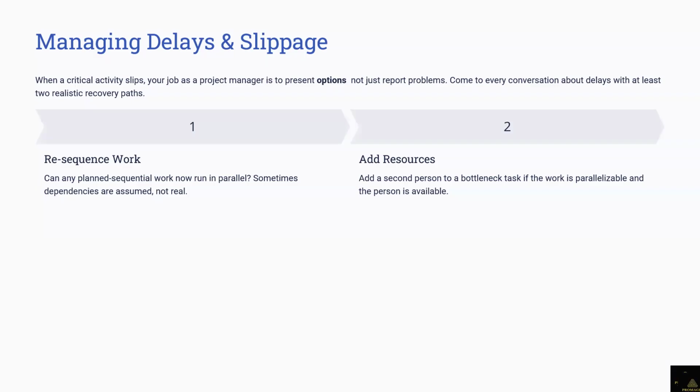If I add more resources, it's going to cost more money, right? If I do overtime, it's also going to cost more money, because the overtime rate is different from the regular rate. So you bring all of those things out, the cost of the resources and the overtime rate, and calculate it. And that's what we are going to use to get back to the client.